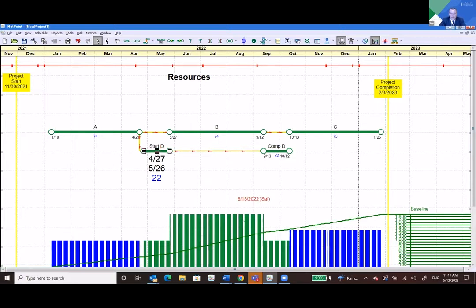Now we have done a good job of leveling off these two activities so that they're not interfering with each other anymore. You don't have that big spike coming in the middle. And you can imagine this could be helpful in all kinds of planning methods where you say, well, for instance, maybe there's some seasonality to the work and you want to move activities out of a super cold season or a super wet season or a migratory bird season.